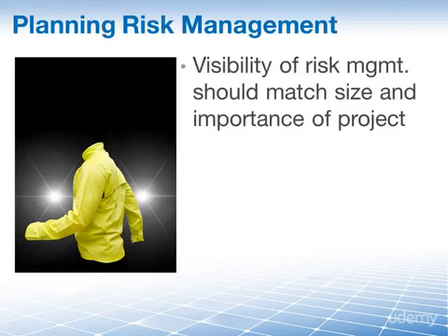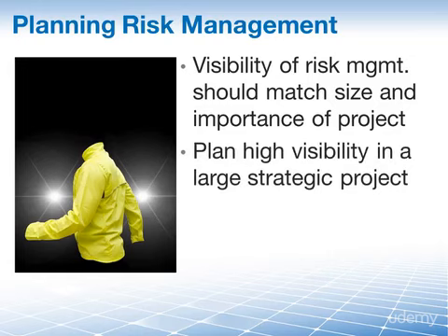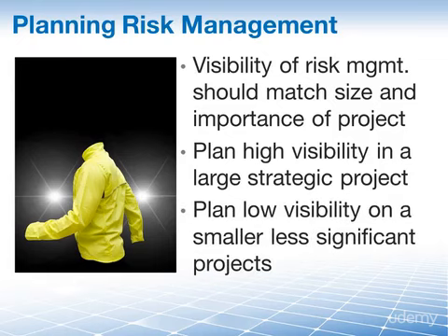By planning your risk management approach early in the project lifecycle, you will ensure that risk management receives the appropriate visibility to the stakeholders and corresponds with the size and strategic importance of your project. You'll very likely plan for high visibility in a large strategic project and low visibility on a project that is the fourth in a series of 6 similar small projects.